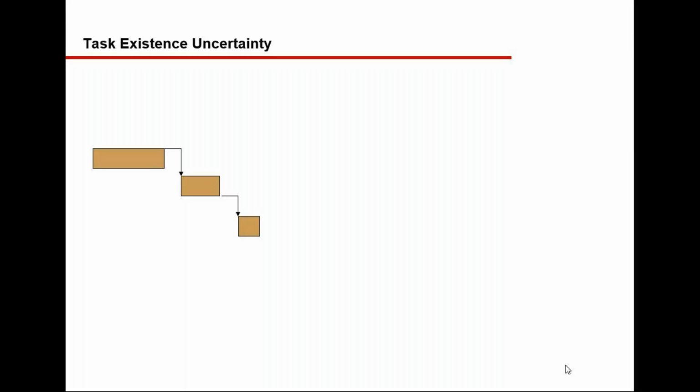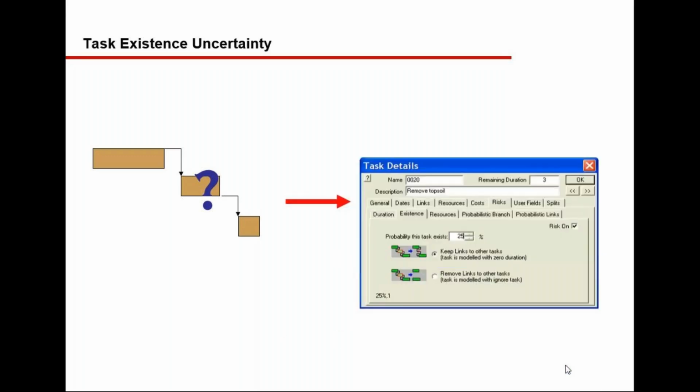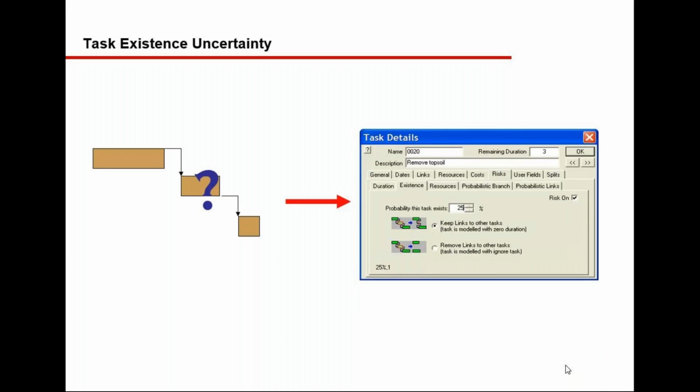We are going into the detailing level. First one is the uncertainty at the topmost level, wherein the estimates made on duration, cost, or resource units are handled. Now there is a sort of if-then-else condition. Task exists and uncertainty is used for applying that if-then-else condition in the Primavera risk analysis. What if I find rock, right? So my plan of action will be different, right?